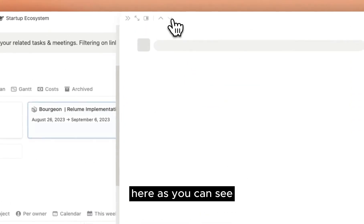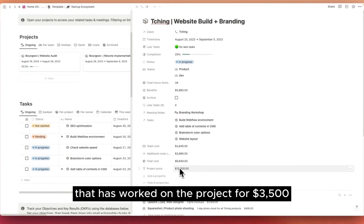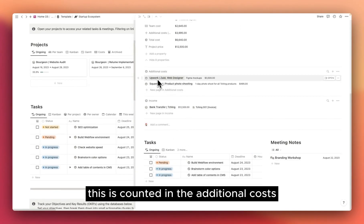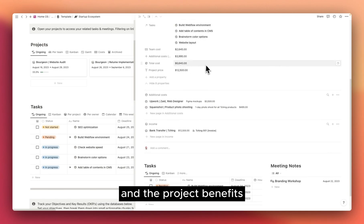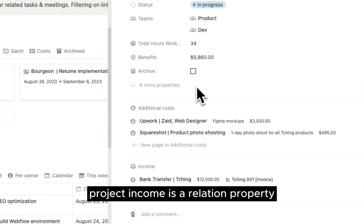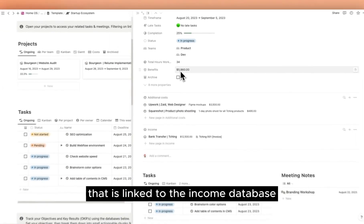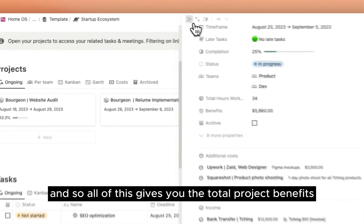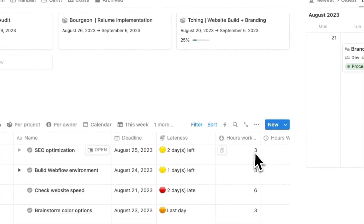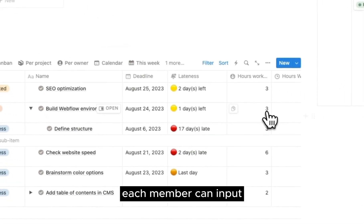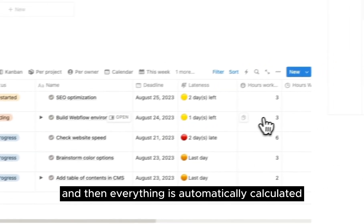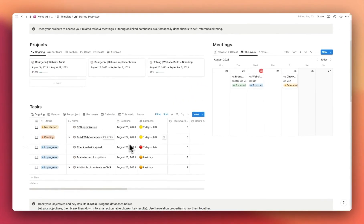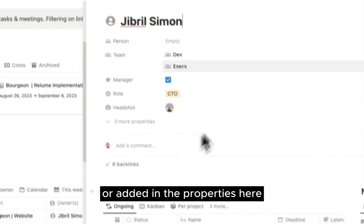Here, as you can see, there's an Upwork web designer that has worked on the project for $3,500. This is counted in the additional costs, total costs, and the project benefits. Project income is a relation property that is linked to the income database. And so all of this gives you the total project benefits for each projects. The hourly rates come from the team database. Each member can input how many hours they worked on each tasks, and then everything is automatically calculated. The hourly rate can be changed or added in the properties here.